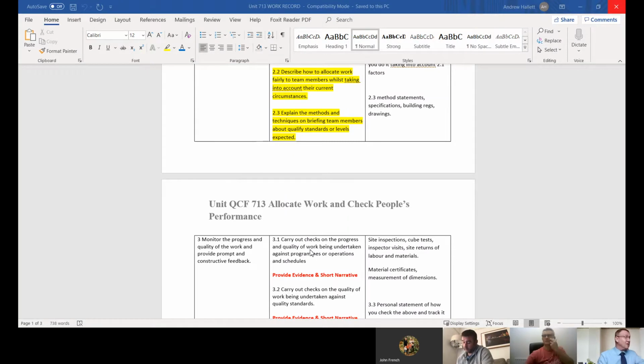So again, you've made them aware of the standards, you're probably briefing them. But likewise, Kieran, a brilliant example there, where work doesn't meet the standards, you raise a technical query. Presumably you have non-conformances as well? We don't. We just raise it as non-compliant. Okay. But then from that it goes to the project team, and then the contracts will raise a TQ depending on the DPE's response, which was the case. They've sent a TQ through, which was verbally agreed by the designated project engineer for the scheme.